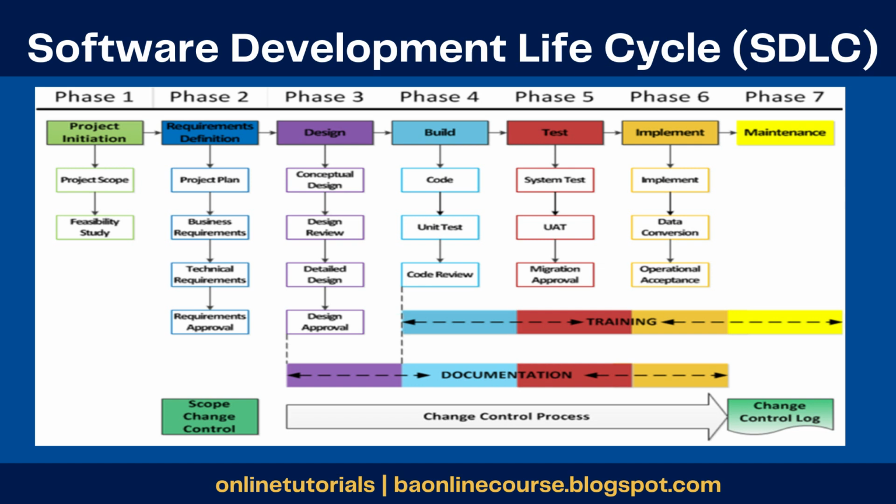And when do you use a waterfall model? When there are short-term projects, probably, or when the client has proper visibility of what he wants, and the requirements get frozen, a solid baseline. That time we can use the waterfall model.